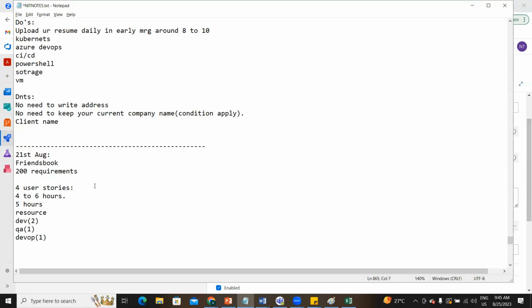So buddy, developers, 2 guys are there. Let's see, A and B are there. So this guy will work for how many hours? 5 hours into how many working days? If you're following a sprint of 2 weeks, 10 working days, right? So 5 into 10? 50. So you'll have around 50 hours of task. Who will do the 50 hours of task? Developer A.